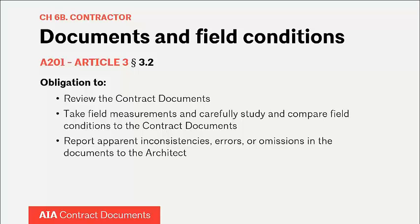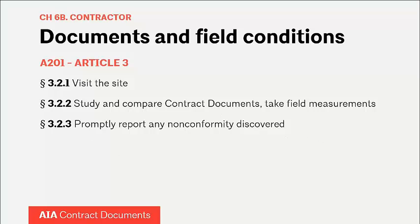Article 3.2 obligates the contractor to review the contract documents, which requires a brief history lesson on the Spearin Doctrine. The Spearin Doctrine is based on a 1918 court decision involving the federal government and a contractor on a defense contract. It held that the contractor has the right to rely on the contract documents provided by the owner — they do not have to fill in the blanks for themselves — and there is an implied warranty associated with the contract documents. Nonetheless, Article 3.2 obligates the contractor to review the contract documents, do field measurements, and report inconsistencies to the architect. This obligation appeared in the very first general conditions document. Understand that this is protection, not inoculation — it is not a backstop for a lack of documentation on the part of architects.